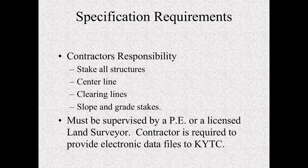They are required as per the spec to stake all structures, center line of the structure, clearing lines, right of way lines, and have slope and grade stakes. This must be supervised by a PE or a licensed land surveyor. The contractor is required to provide all electronic data files to the cabinet.